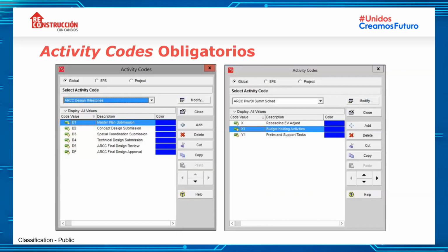But as a consequence of the variations on the budget, it could be that there are earned values that you stopped earning in the previous months that you need to add or discount, or the opposite can happen, that you earned exceeding what it should be if you consider the updated budget. So that's how our guidelines are requesting it, that we need to make an adjustment to this earned value in the immediate following period.